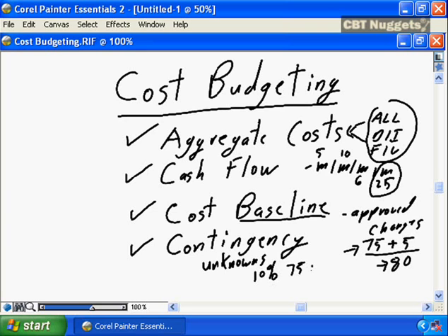It's $75,000 plus the contingency, and for round numbers I'm going to say 10% is an additional $8,000. So your total project budget is $83,000, and that's excluding change. Change would increment that ongoing as the project is delivering.